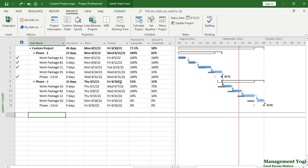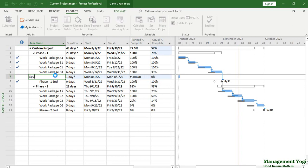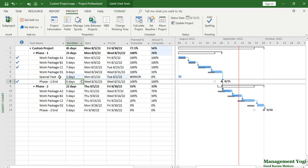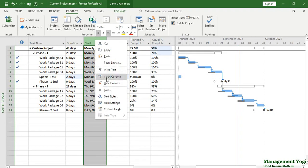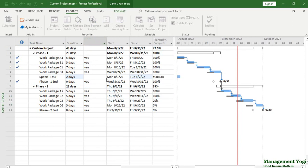There is another scenario — people ask me: what happens if I add a new task? Will the formula work? Let's see. Before phase one is getting completed, let us say we have another task, so I'll right-click, choose Insert Task, and add a special task with a two-day duration. Here also in the plan percent complete we are getting an error. The reason is that for this special task we do not have the baseline set.